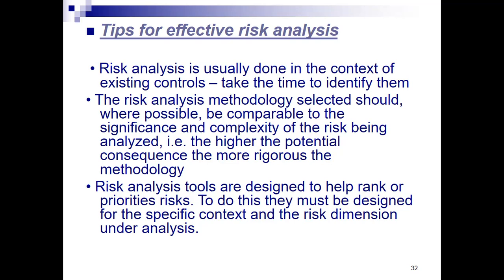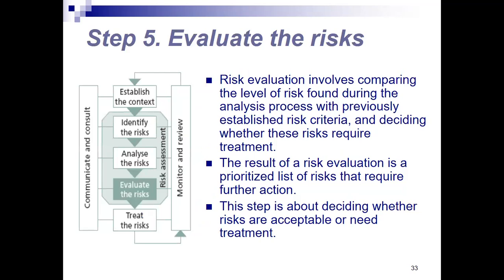To do this, they must be designed for the specific context and the risk dimension under analysis. And our step 5, evaluate the risks. For this one, we evaluate whatever we have analyzed, and this would involve comparing the level of risk found during the analysis process with previously established risk criteria, and we have to decide. So with that, are we going to do some treatment or treatments? The result of a risk evaluation is a prioritized list of risks that require further action. This step is about deciding whether risks are acceptable or need treatment.